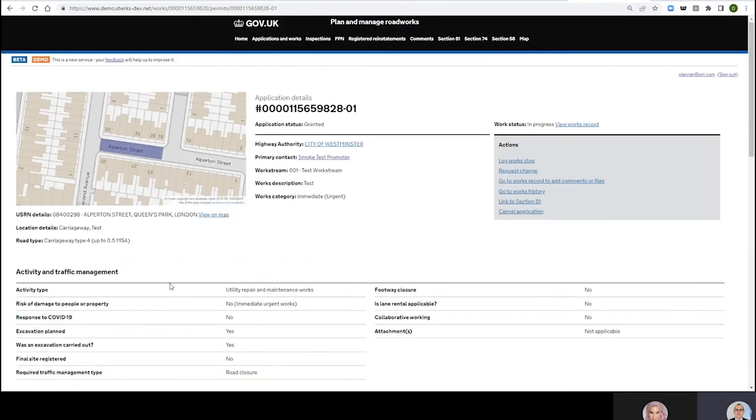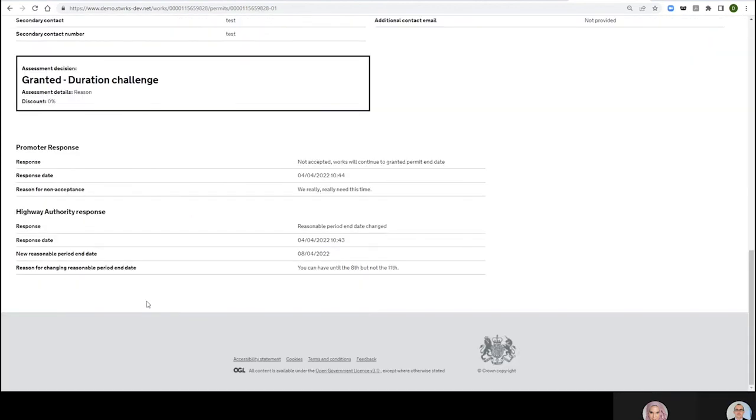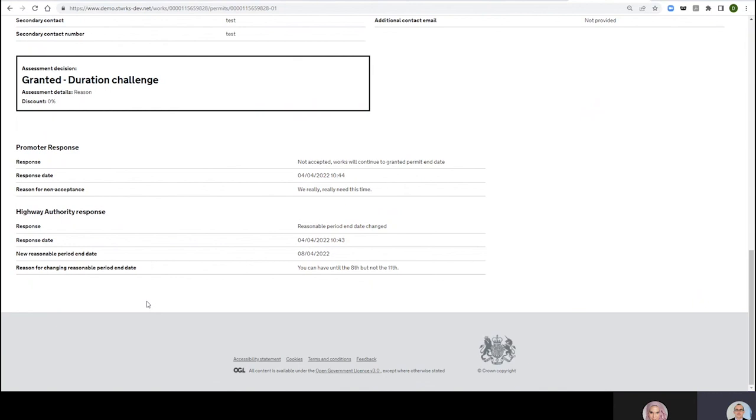So there we go, really that's the end of it. We've gone through a duration challenge, a non-acceptance to that duration challenge, the highway authority considering that non-acceptance and responding to it, and then we've got the promoter's ability to go back to it. You can see that once the highway authority goes back, it's not essential for the promoter to respond, like life can continue if they don't respond, but it works better for everyone if we're recording our dates here and recording our beliefs and what happened and the issues we faced with the job. It's better to refer back to at the time.